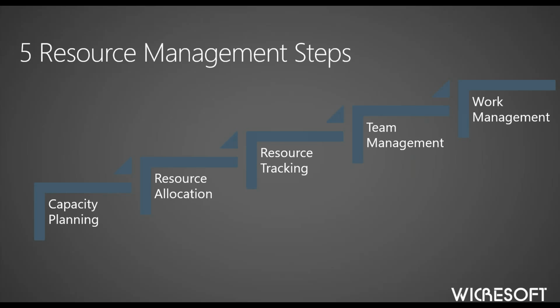So what are some of the resource management steps that we might go through? Well, early on, we might do capacity planning. We think about that as really high-level capacity planning. What resources do we have on hand? And then for the projects and other work that we have, what are the high-level, FTE-based requirements or role-based requirements that we might have that we need to apply to these particular projects or elements of work?